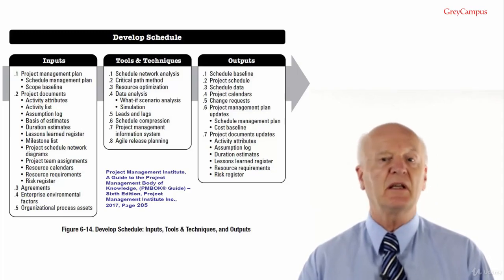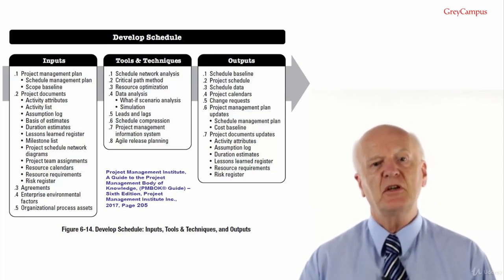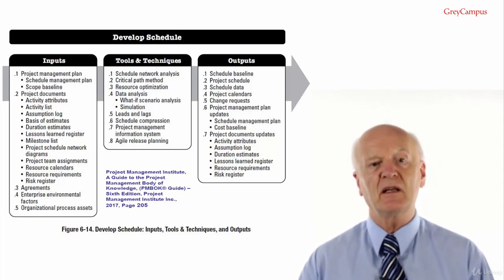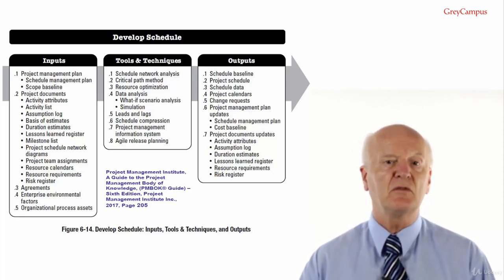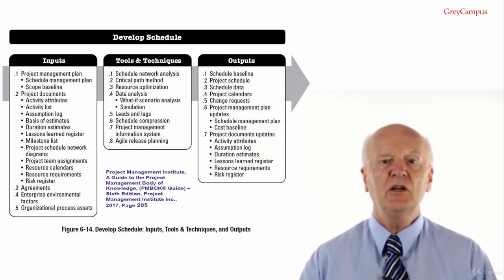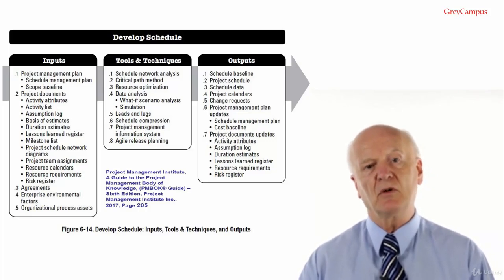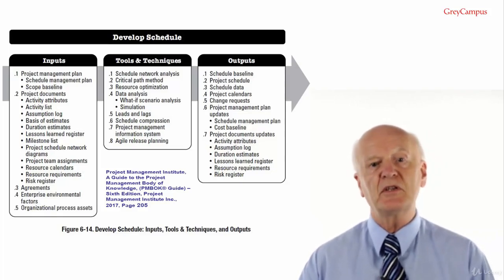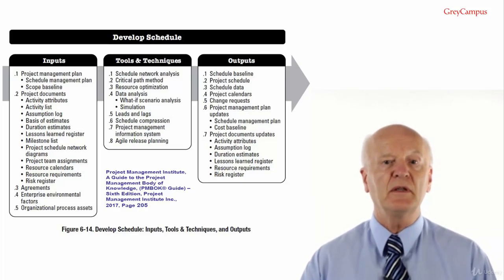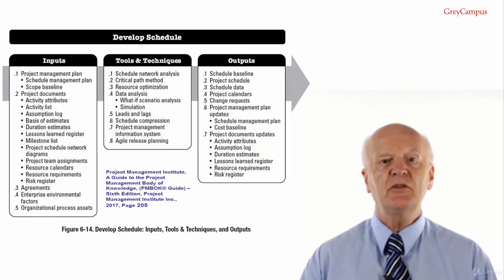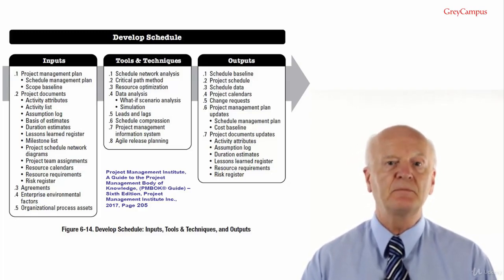Develop schedule tools and techniques. Number 1, schedule network analysis. Schedule network analysis is a combination of a range of techniques used to generate the project schedule model. Schedule network analysis includes critical path method, resource optimization techniques, modeling techniques, aggregate schedule reserves to produce the probability of a schedule slip when the project paths converge at a single point in time, or when multiple paths diverge from a single point in time to reduce the probability of schedule slip.